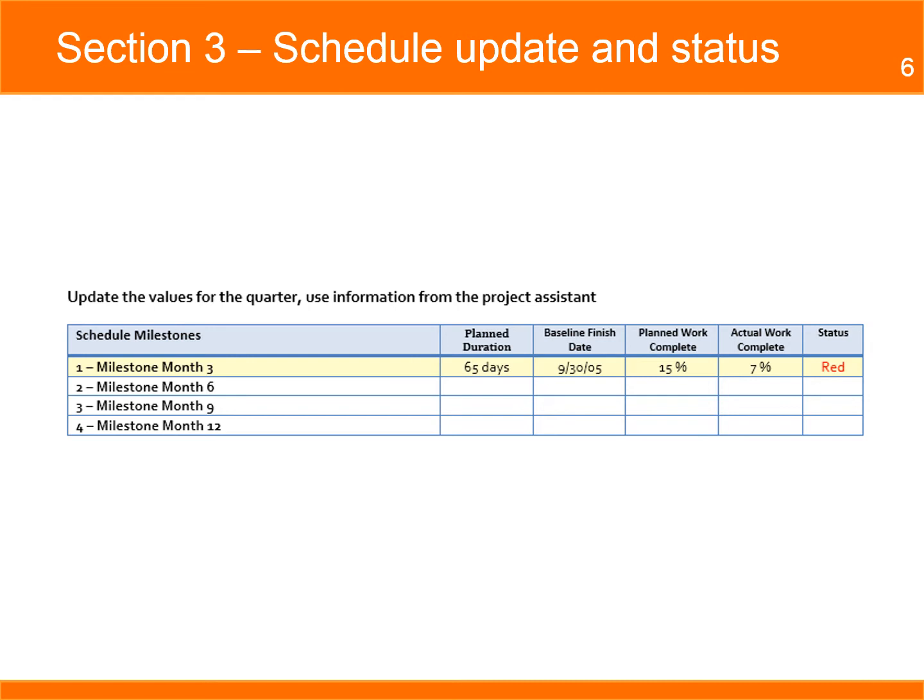The next box contains information about the schedule and progress made in the deliverable of all planned work. Every week you will receive an update on the status of the schedule. If the project is late by more than 10% of the planned schedule, the status is red.